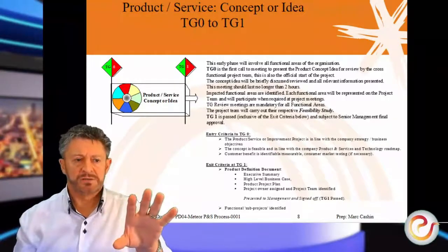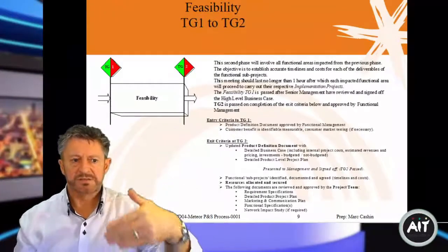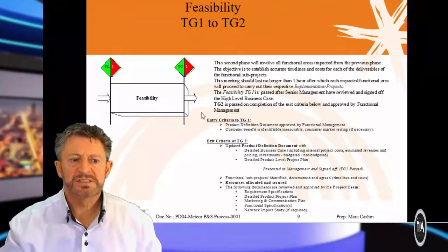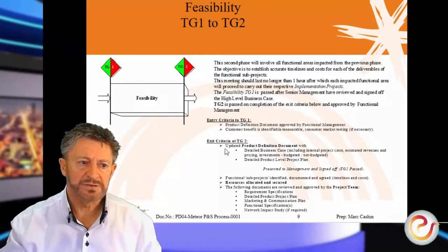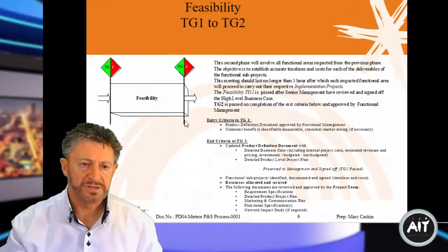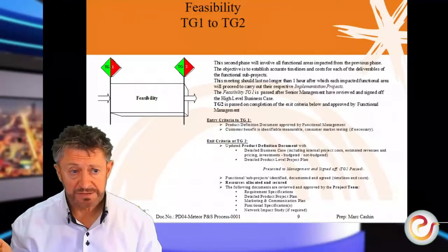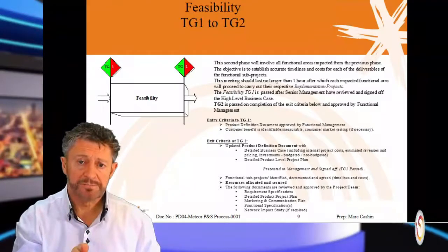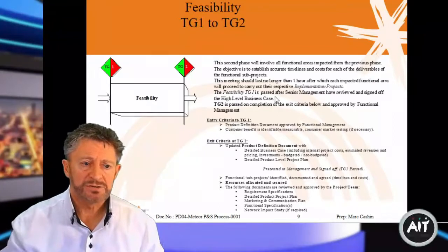Now the rest of this document kind of describes the same thing, with more detailed information. But what's important about it are these points here. So we had decision points, the entry and exit criteria for each of them. Now, if we look here, for example, at the end of the feasibility, what was the exit criteria? And bear in mind that we only move from one phase into the next phase. So we only moved from feasibility into implementation when we had agreement. And we say, yes, we can sign off. And the reason we had the agreement was because these are the criteria.